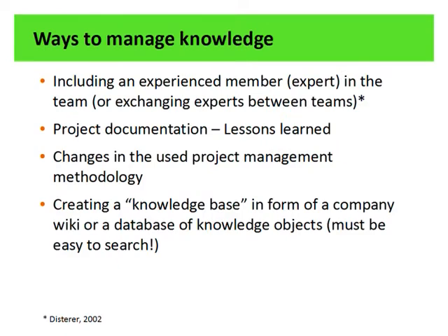There are multiple approaches to knowledge management. One of the good methods to transfer knowledge is to include an experienced member in a project team. This will allow us to directly use the knowledge of the member without the need to formalize it and cut it out from its original context. Including a lessons learned chapter in project documentation is also not an unusual method of knowledge management.